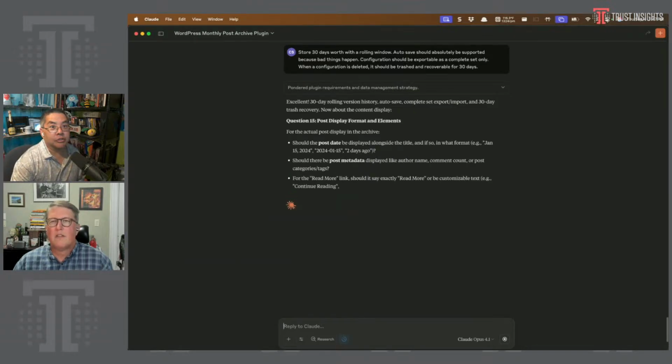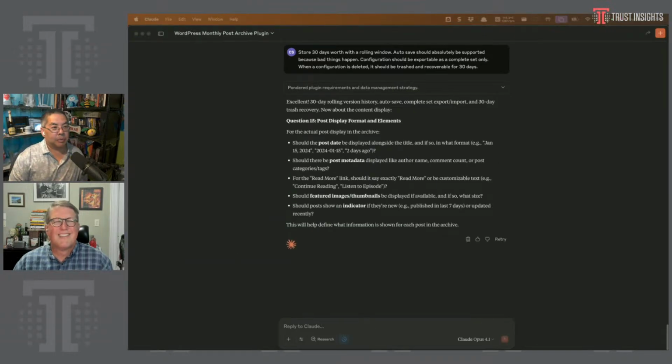So in the interest of time, since we're almost at time, we can keep answering these questions outside of the live stream, but this is the process. Once you do this, it will draft a product requirements document. And then as we did with the original plugin, from the product requirements document, you say, now build me a file by file work plan from least dependencies to most dependencies about how you would implement this. And then you have your coding agent review the work plan, look for problems, and then say, off you go and build the thing and let the machines chew on it.